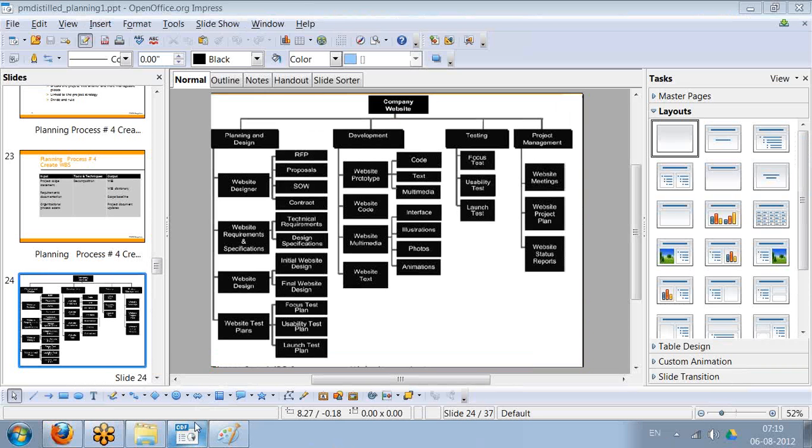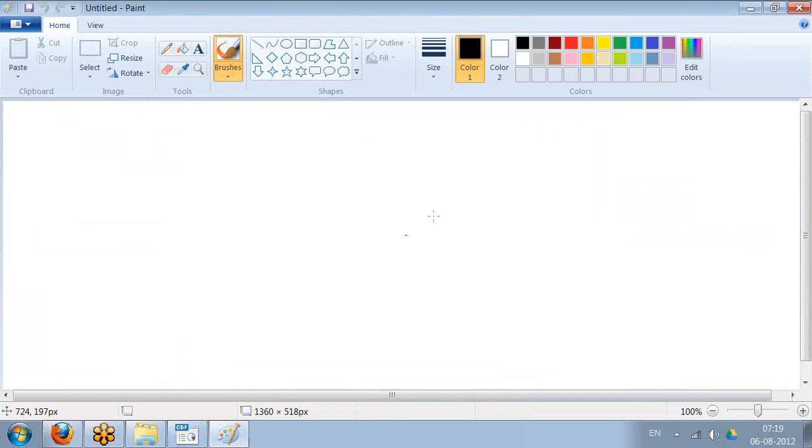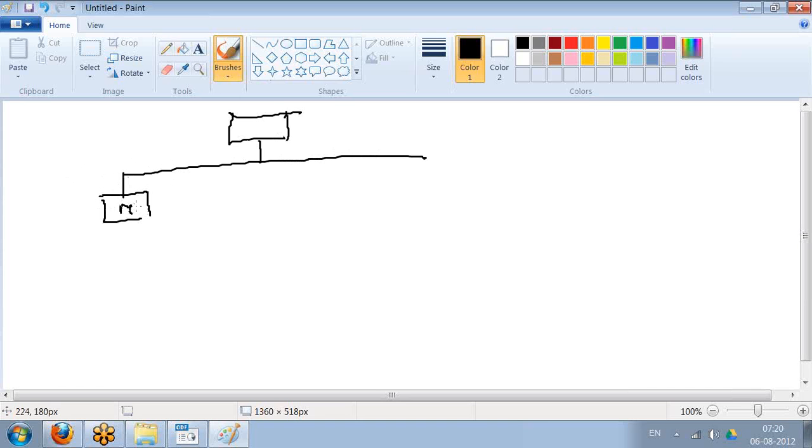Generally the illusion is it will take only 2-3 hours, but the moment you do a WBS, what happens is, okay, now you have this party for 10 people. The first thing would be the menu. You have to decide on the menu. Then you have to create the shopping list. Then you have to do the shopping. Then pre-cooking activities. Okay, then only the cooking starts.